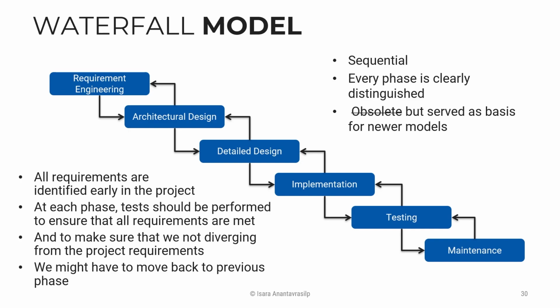The waterfall model is useful for small projects because the requirement set is small. The chances that they're going to change would also be low. And even if you need to come back to change something right at the beginning, at the top here, it wouldn't cost you too much because the project is small anyway. It is also quick because you can just set aside time: if the entire project is 2 months, you can say in 2 weeks we need to finish this, then spend another 4 weeks on this, and then another 2 weeks for testing and producing manuals and other kinds of artifacts. So don't throw out Waterfall just yet.